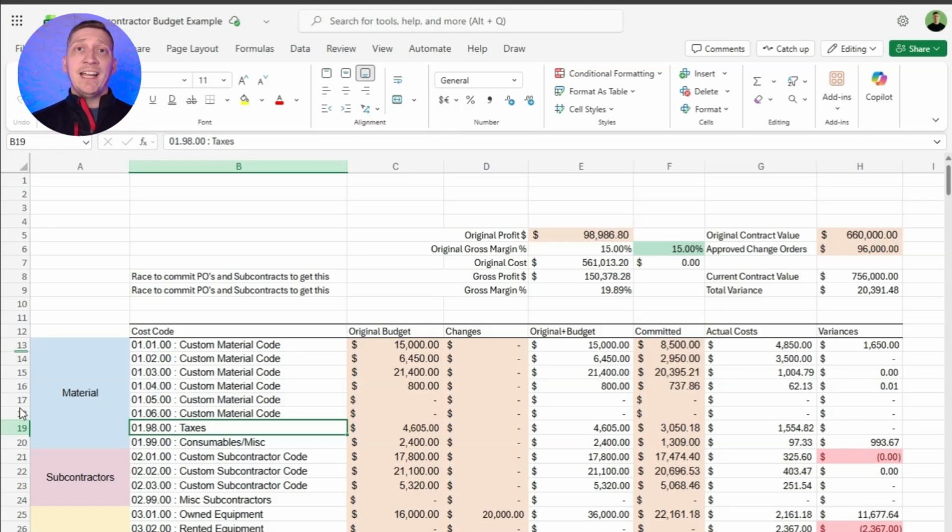Because at the end of the day, anybody who self-performs, this is your biggest risk. You can mitigate risk when you buy all the material, but you can't mitigate risk when you have people out there and they underperform, or it wasn't up to the number of hours that were estimated and you have to eat the cost. No other industry is like construction.